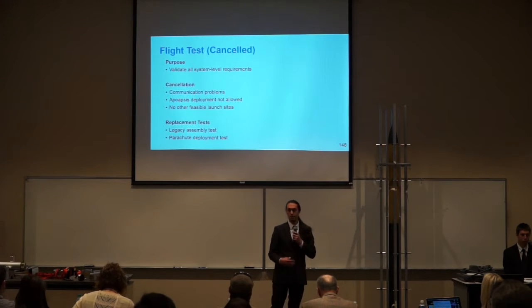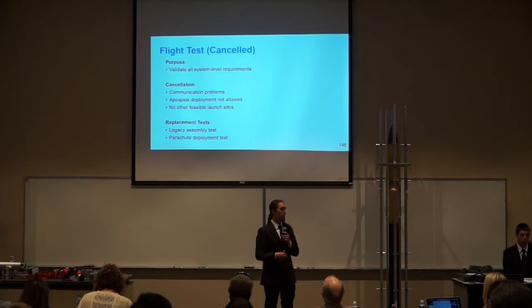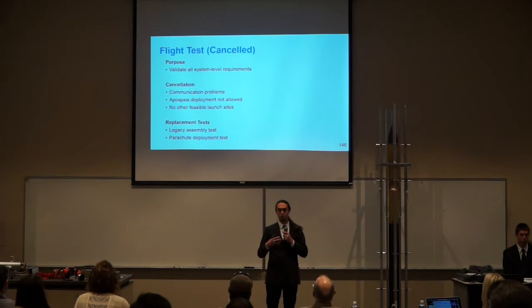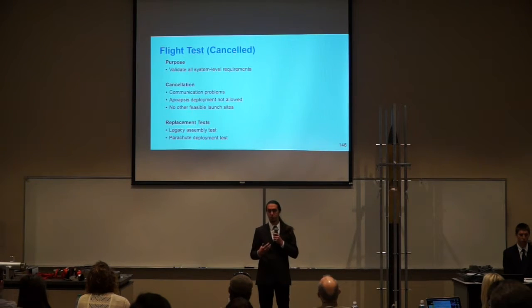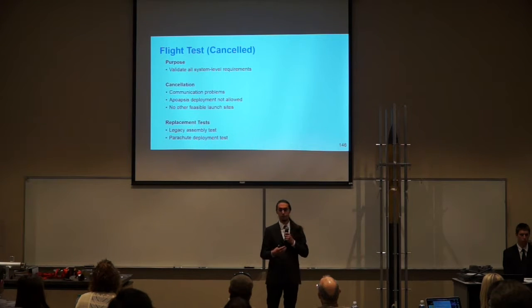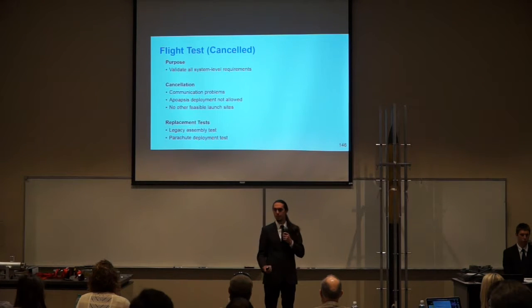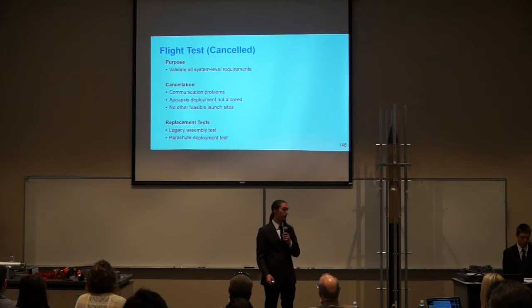So talking about the canceled flight test, we had planned that the flight test was going to validate all of those system requirements at once. However, as Michelle mentioned earlier, we had some problems getting into contact with the prefect of the launch site. And also, once we did, we found out that the Apoapsis deployment was not allowed at that launch site. And by that time, we could not find any feasible replacement launch sites for our rocket.